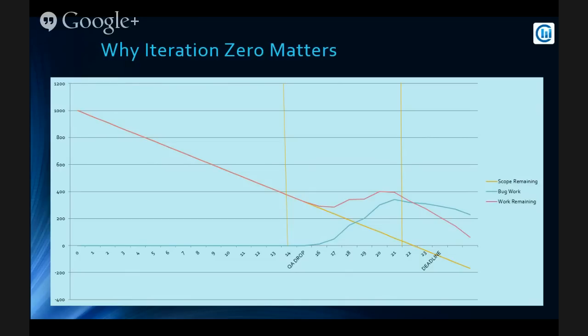And so many times, we give ourselves a really good sense of how good we're doing because we're laying down a lot of code. And then QA drop hits and they expect it all to work for real, and then there are some bug reports. And then, oh, it can't. And so then we're derailed and it completely goes off the rails. And then we were given the, oh, it's on track, we're on schedule, on track, on schedule. And then we're not on schedule.